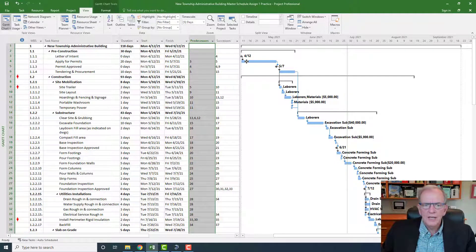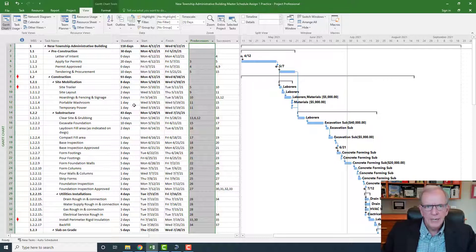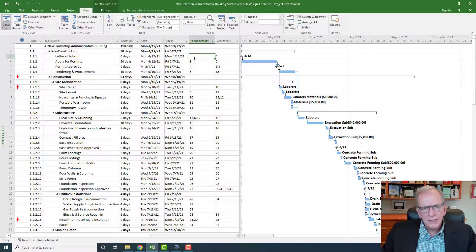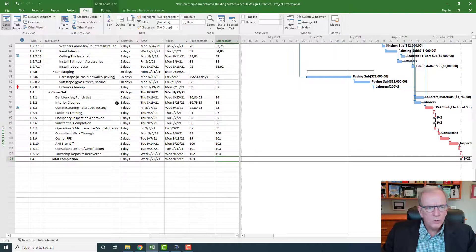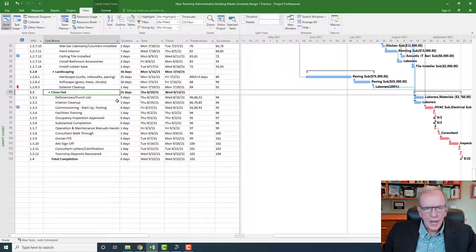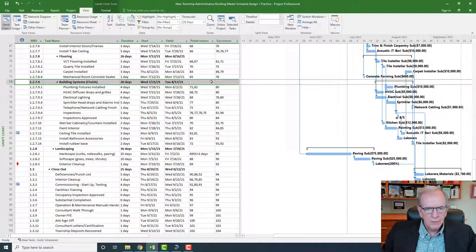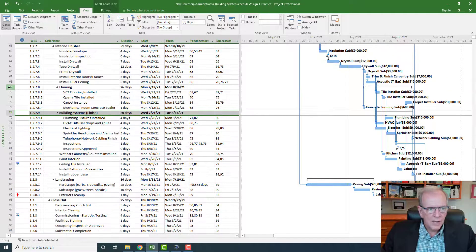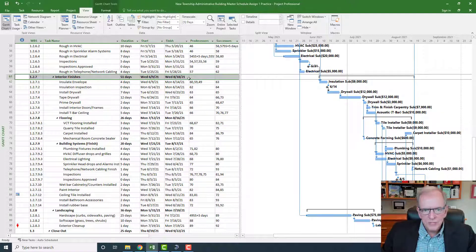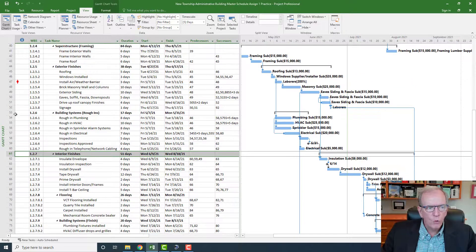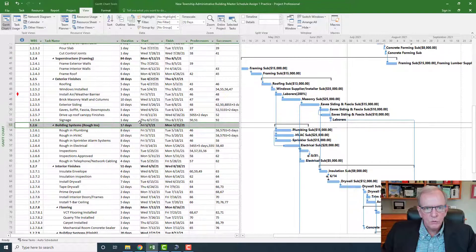One of the ways to check is to look at the predecessors and successors columns. Best practice — following PMI scheduling best practices — is that everything should be connected, meaning no open ends. The first activity shouldn't have a predecessor and the last activity shouldn't have a successor. Also, your summary headings shouldn't have any links to them. Nothing should be linked to a heading — that's another best practice.